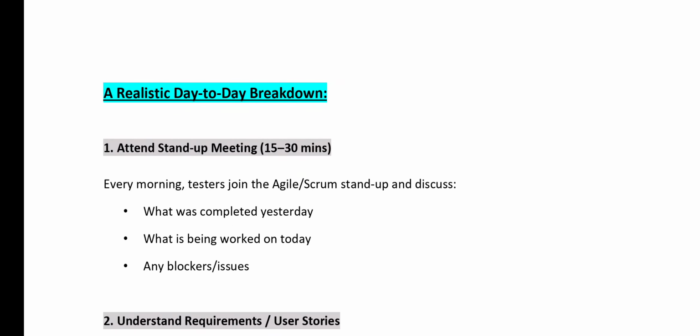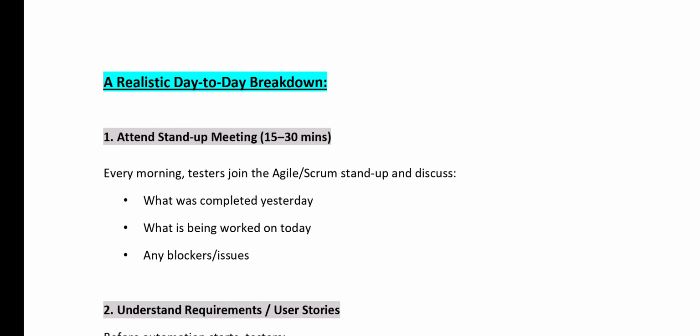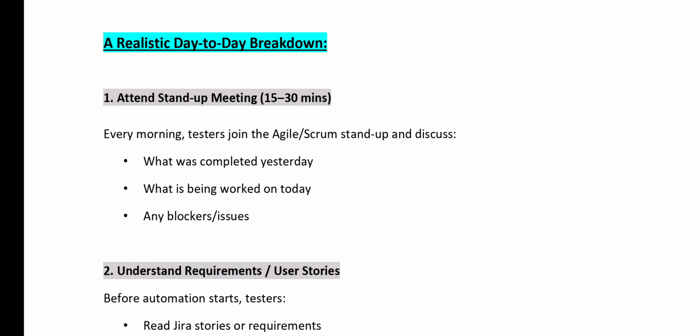Here is a realistic day-to-day breakdown. Okay, the very first thing is attending the stand-up meeting daily. Every morning testers join the agile or stand-up meeting call for 15 to 30 minutes and discuss what happened yesterday and what is being worked on today, and whether there are any blockers or impediments or issues.